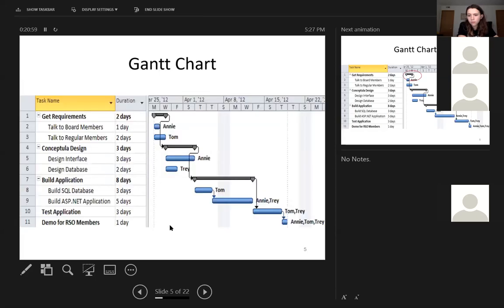Very good observation, class. And here I'm showing you a visual representation of the same ideas that we've been discussing so far. On the left, this is actually what you see. It's a task sheet, part of your work breakdown structure, because I was not able to show you everything, but it has dependencies, it has the start time and end time, and it has the hierarchy on the left. So this is a Microsoft Project task sheet, and what you see on the right, we call a Gantt chart. It shows the same information just visually.